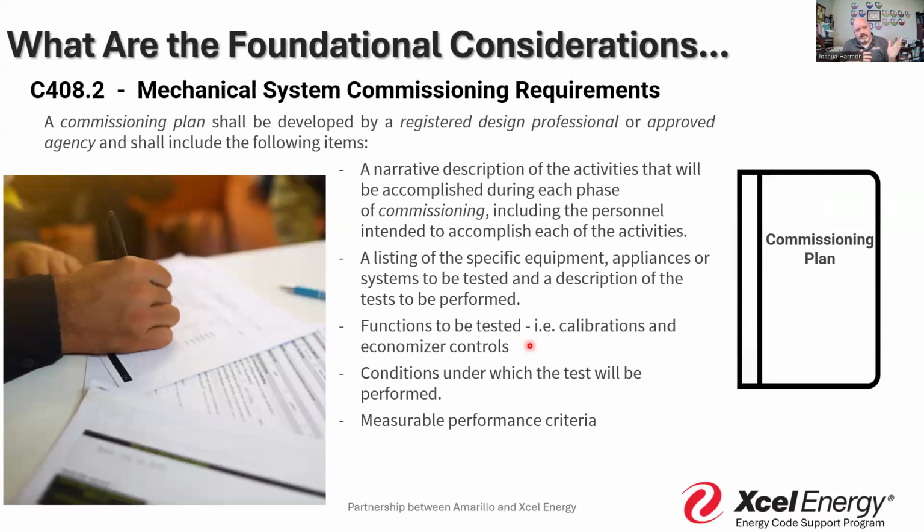But if we're thinking about these larger commercial operations, those larger multifamily, 3-story hotels and motels that fall under the residential provisions, it reminds us to kick back to the mechanical systems, kick back to commercial. And the commercial code tells us that we need to have commissioning reports, that there is certain information we need to provide prior to the beginning of the process.